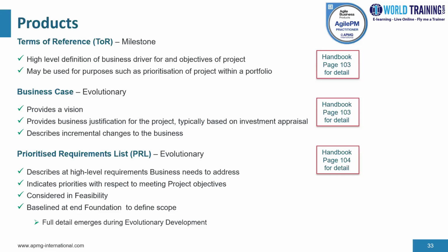Baselines of the business case are typically created first as an outline by the end of feasibility, then as a basis for approval of development by the end of foundations. It is formally reviewed at the end of each project increment in order to determine whether further work is justified. It should be kept in mind informally throughout the project to inform decisions in line with benefit delivery and to become aware of any potential threats to the viability of the project at the earliest point.